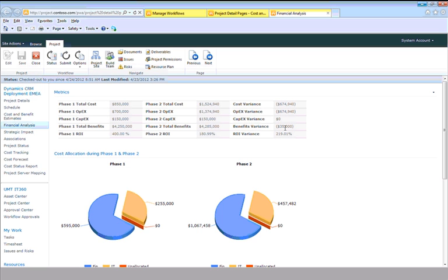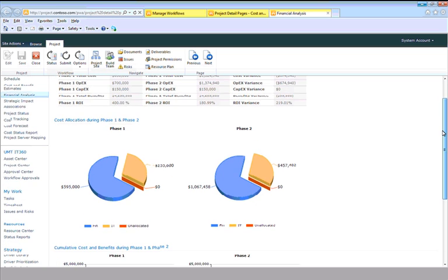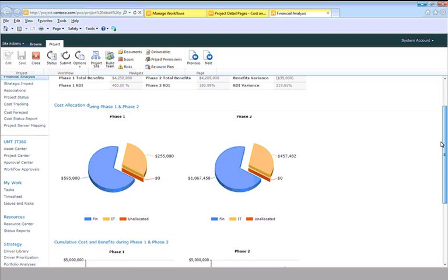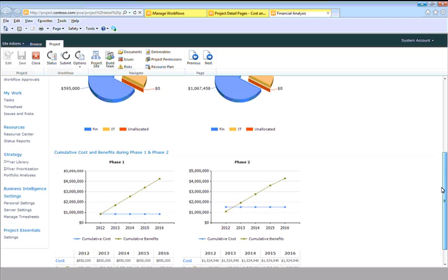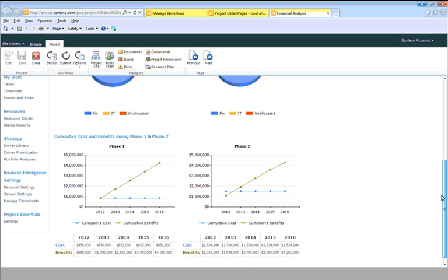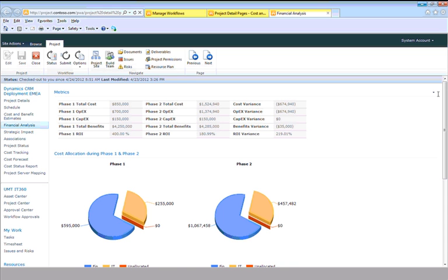Again, this delta may help you decide whether or not you want to re-optimize the portfolio if the financials have differed significantly between the high-level budget, phase 1, and the detailed budgeting in phase 2. We can also see graphics that are looking at the differences potentially of any percentage allocation to funding sources. We can look at different payback periods, cost and benefit breakdowns, etc. Very easy to create these reports on top of the reporting infrastructure that is available.